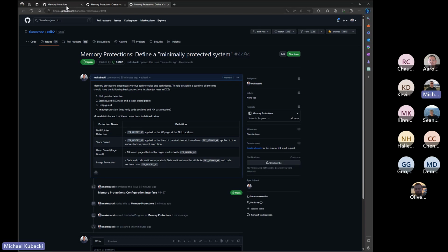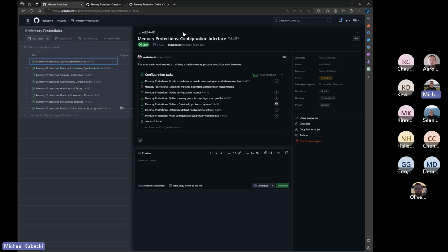One of the other things that the project does in terms of allowing you to keep track of work is it allows you to plan for iterations and milestones. So I created weekly iterations for this project because I was thinking for lower level work, we probably want to plan weekly. Like I'll roughly do this in 2 weeks, or I'll get it done in 3 weeks or whatever. So that's what the iteration is for.